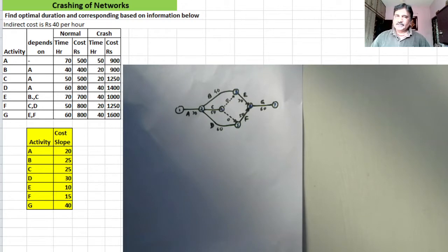On connecting the nodes with zero slack, satisfying this condition will get you the critical path. Though this process is simple, if you are required to find the critical path every now and then, it will be a time consuming process. So we have another process by which we will be finding the critical path, because in crashing of networks, as you crash certain activities, durations change, and you will have to find a new critical path.